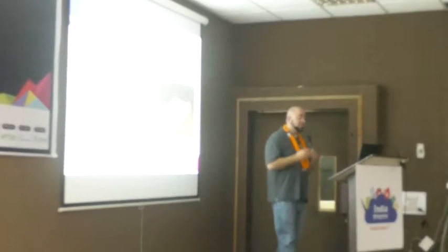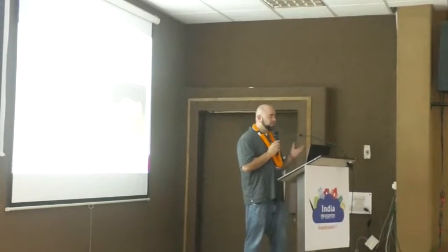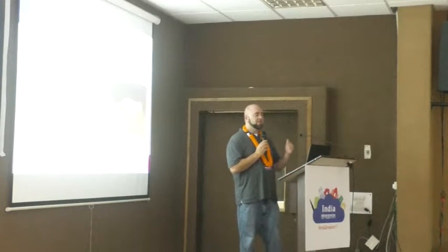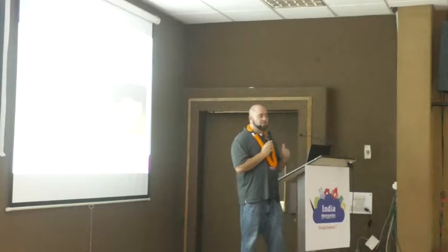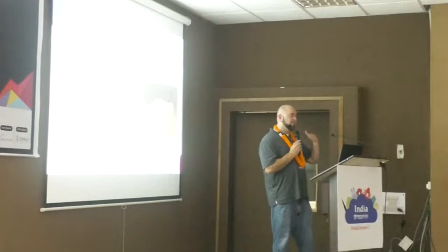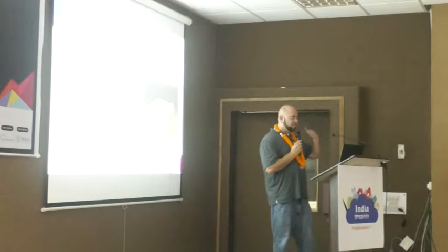Next we have our sprint backlog. The sprint backlog are the actual tickets that you're working on within that specific sprint. There should be a single sprint backlog, because you're only working one sprint at a time. No open dependencies, so you shouldn't be bringing tickets in if the dependencies for those tickets haven't been completed in prior sprints, or within that sprint, you would prioritize any dependencies if they're all in the same sprint.